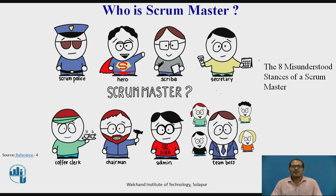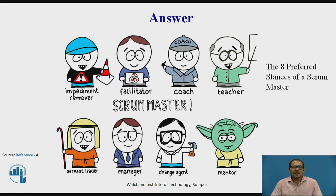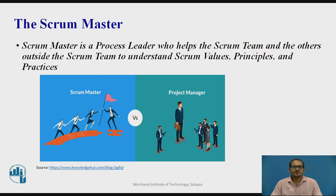Who is the Scrum Master? There are eight misunderstood stances of the Scrum Master. Is he a Scrum Police, Hero, Scribe, Secretary, Coffee Club, Chairman, Admin, or Team Boss? No, he is not. The eight preferred stances of the Scrum Master are: Impediment Remover, Facilitator, Coach, Teacher, Servant Leader, Manager, Change Agent, and Mentor. The Scrum Master is a process leader who helps the Scrum team and others outside the Scrum team to understand Scrum values, principles, and practices.